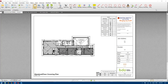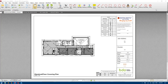I had a case with a franchisee several years ago where he accepted a set of plans provided by the client. When he went and looked at them closely — after the contract had been signed — he realised there was a 50 square metre error in the way the areas were measured. He took that to court and he lost. He had to provide the extra 50 square metres at the price he quoted, because he's a building professional — he should have checked and known that beforehand. That's what the court found.